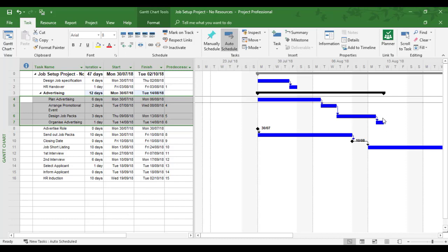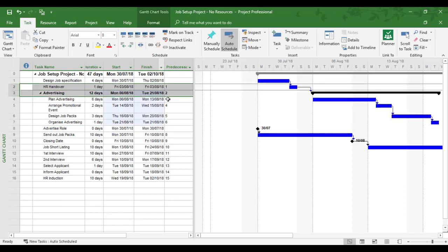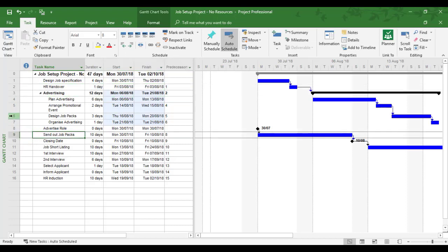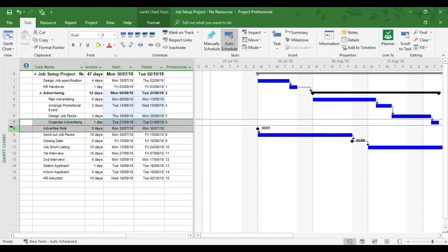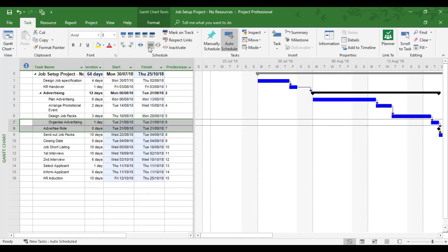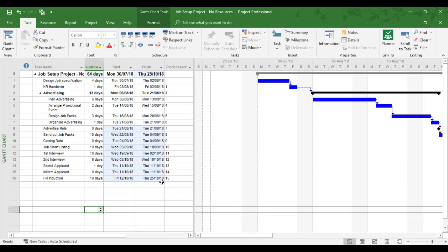Finish the start so we can see them joining together. I'm now going to join two and three. And I'm going to rejoin them. Going to rejoin seven, eight together. So it was 62 days plus the two days for the promotional advertising event. So arrange the promotional advertising event. That's now taken another two days. So 62 plus four. So I know that's correct. So we can quickly see how we can work this together.